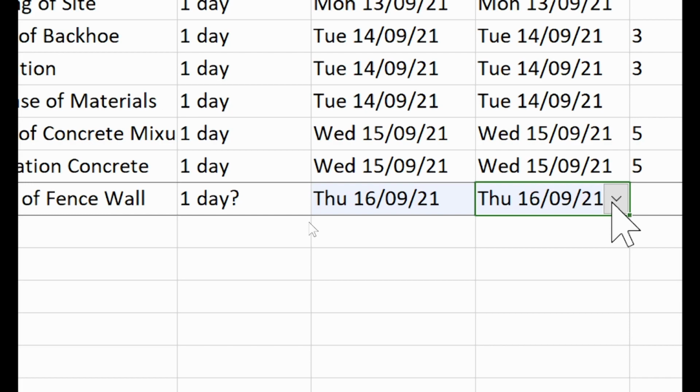5 masons, and 10 laborers. Laborers 1 to 1, 1 to 1, 1 to 1. Make concrete for them, and mortar for them, and make blocks for them. Okay, mason 5, give it 10 laborers. No problem. That's like 15. 5 masons, 10 laborers. Okay, so let's keep that in mind.